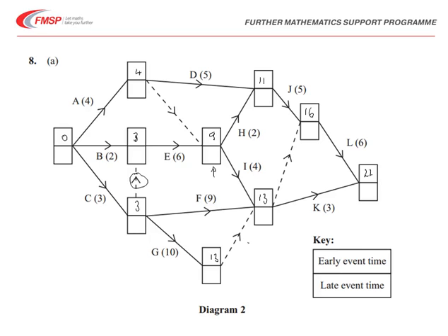Working backwards in a similar way, we're this time looking for the shortest paths to each point. So working back from the 22, taking away 6 for L gives us 16. And so the 22 minus the 3 would be 19, but that dummy variable in here means that we have to take that into account. So in fact the shortest path, the smallest value there, is 16 rather than the 19.